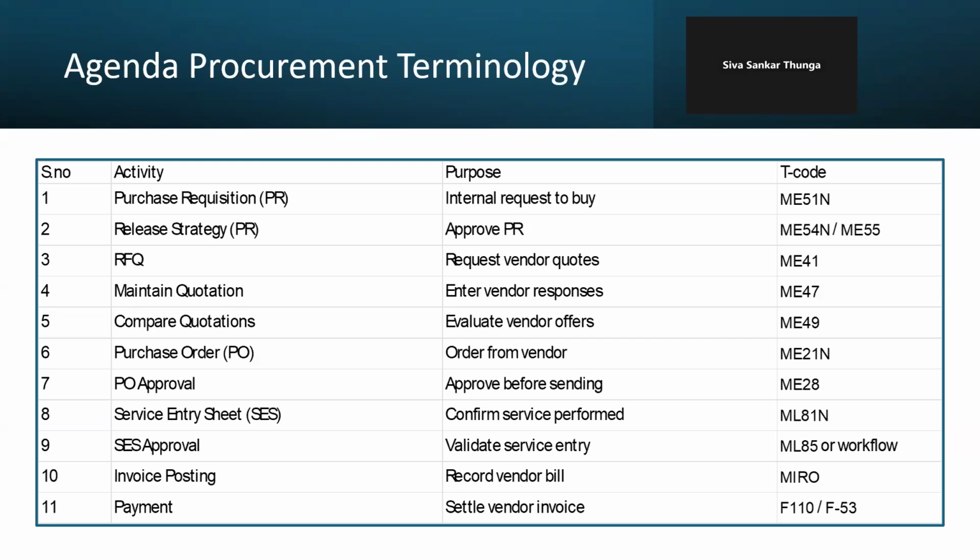Now, next is request for quotation. Assume that the purchase requisition is approved. Now, the purchasing or procurement department will approach the vendor as per the requirement raised by the concerned department, like civil or electrical. For that, they will float inquiries for quotations, requesting a quotation for, for example, this much steel, sand, or cement.